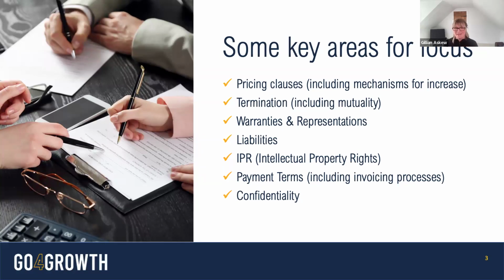And some of them that we've seen can be as short as 5 days. So it's worth inquiring as to whether those facilities exist if it's not mentioned in any of the documents. Payment of invoice will usually be conditional on having all of the correct information contained in the invoice and it being submitted in the right format to the right place. That might be electronic. You will almost always need a purchase order.